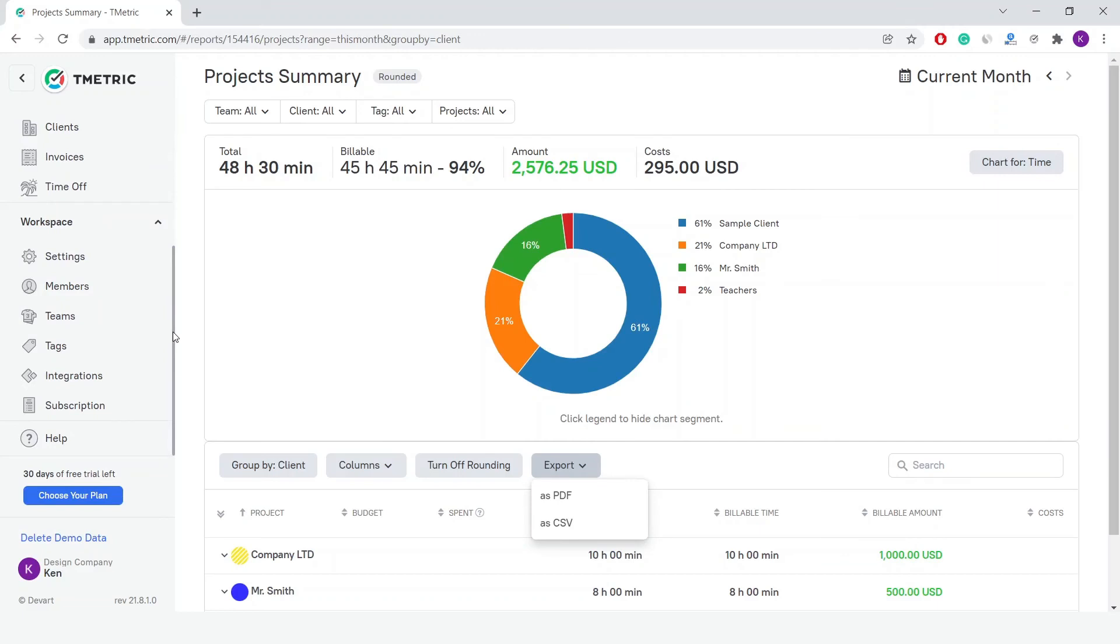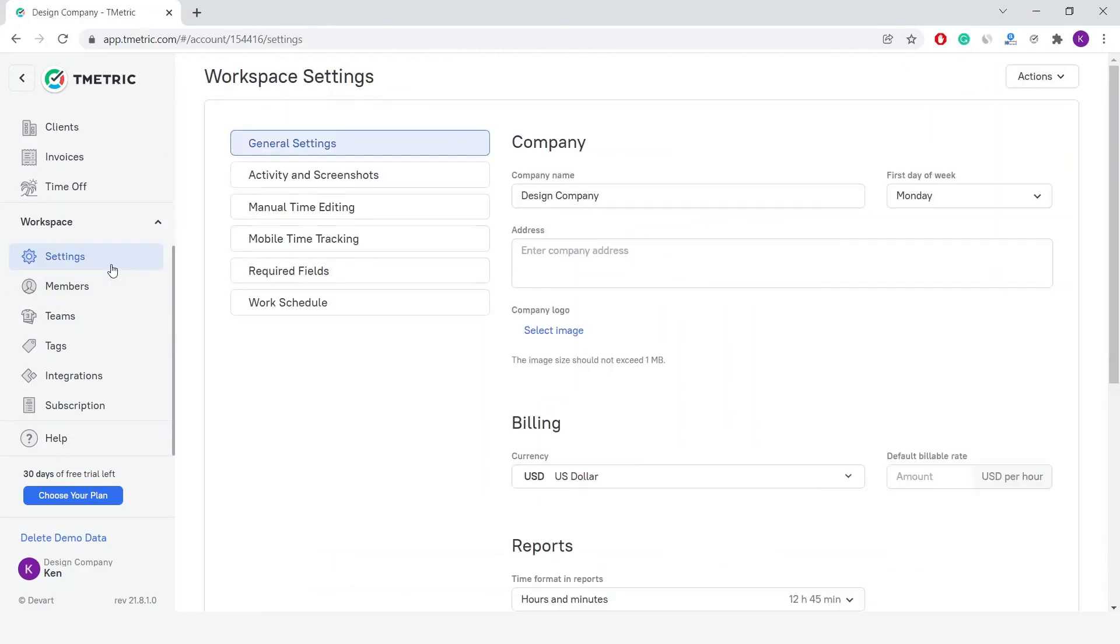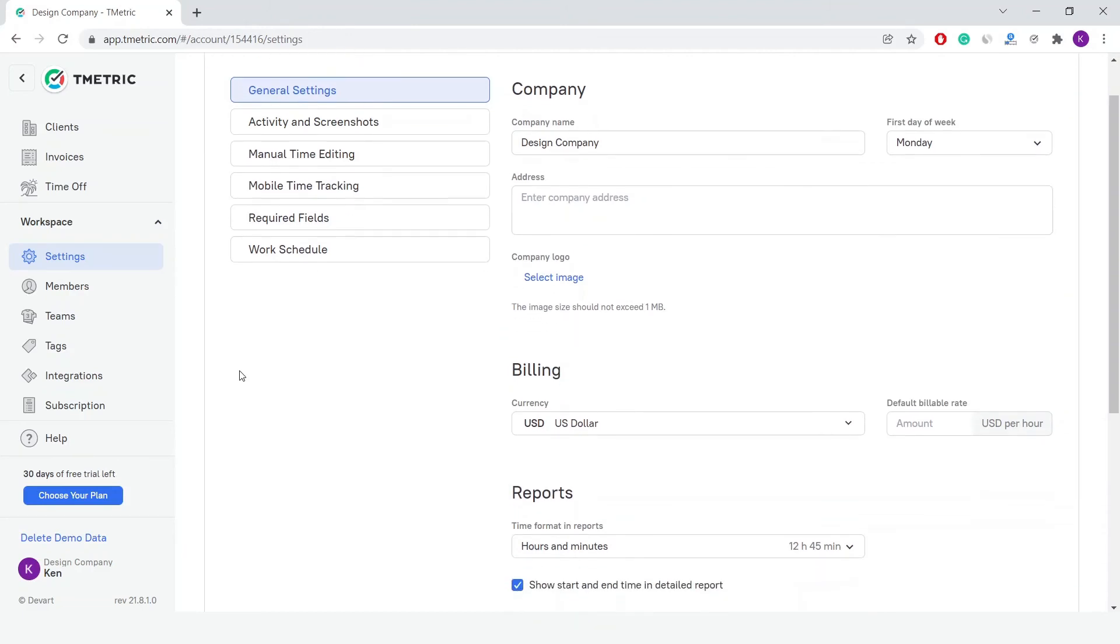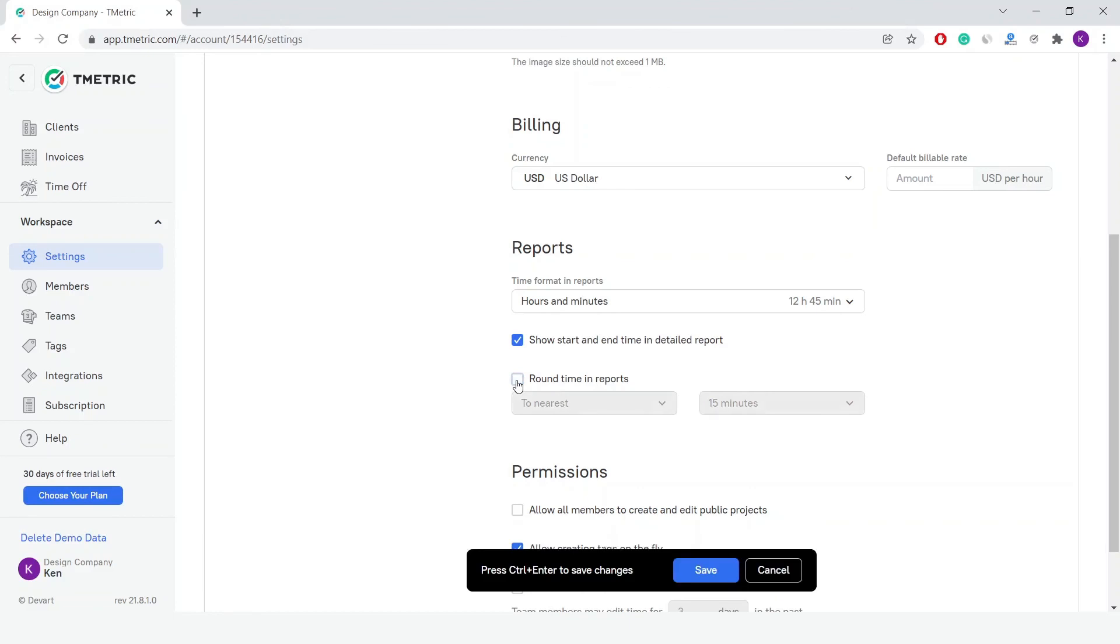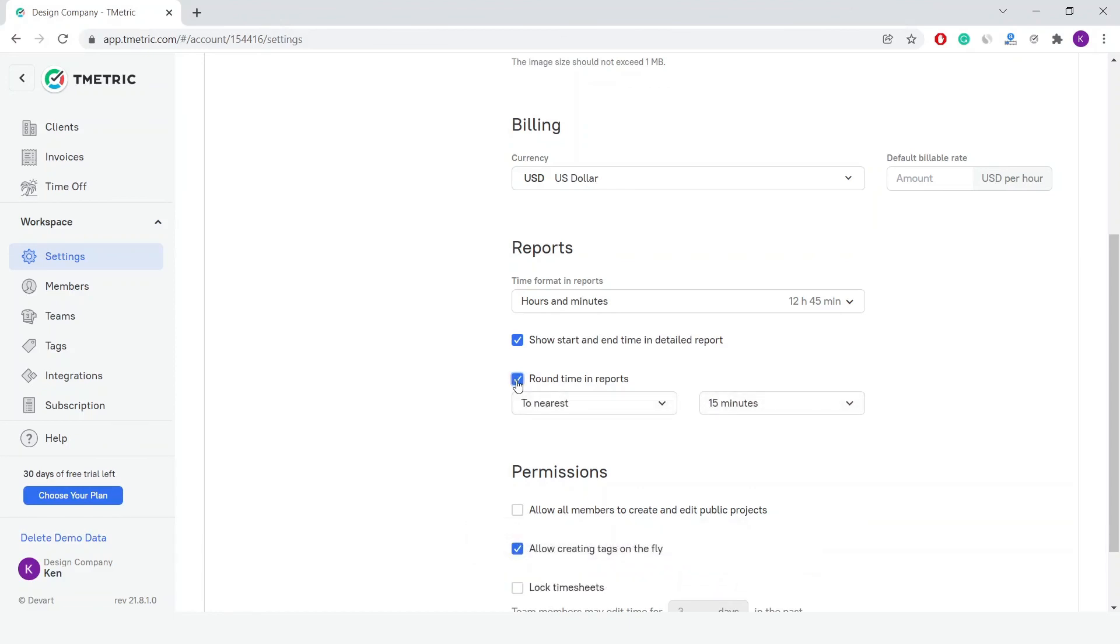Furthermore, you can change the workspace settings related to reports, which allows you to customize a report to fit your needs. Here you have a chance to enable or disable time rounding in reports. For billing purposes, it can be useful to round time entries in reports, for example if you charge your clients on an hourly basis.